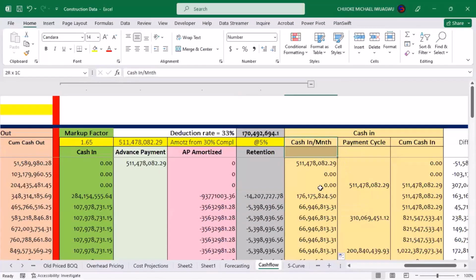That's why after having this monthly income that we're expecting, we now talk about the actual monthly income: how often this money is supposed to be coming in. It will not be coming in every month. It will be coming in after an interval of maybe 2 to 3 months. Now we have a gap between 56 days, which is roughly about 2 months, which is why we have these 2 cycles here. So on the next month, you have a certificate.